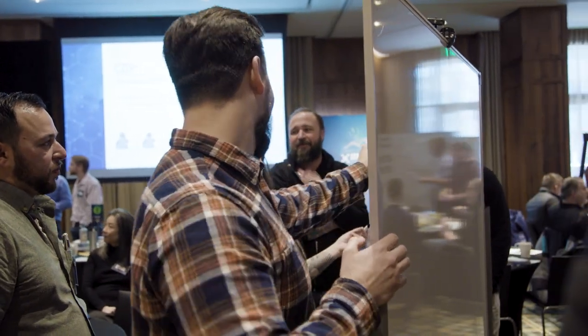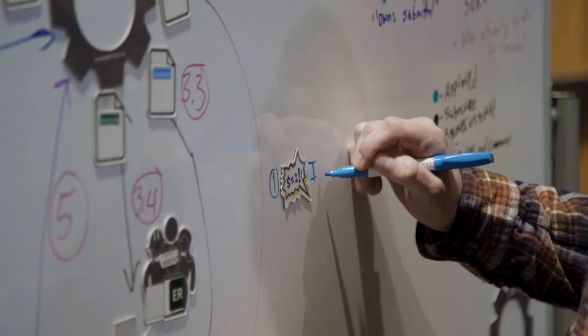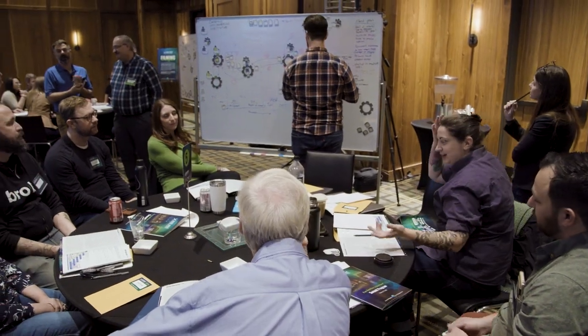The main solutions to increase productivity in submittal processes: first, have a defined list of what we're submitting and the rules — where it goes, who's expecting it, and what they're expecting. Second, the utopia state is a common CDX at a project level where everyone inputs and pulls data from one common system. That system has rules to disperse data to the right people, and when approved, knows who to send it back to — substantially decreasing the lead time between submitting and getting all approvals back.